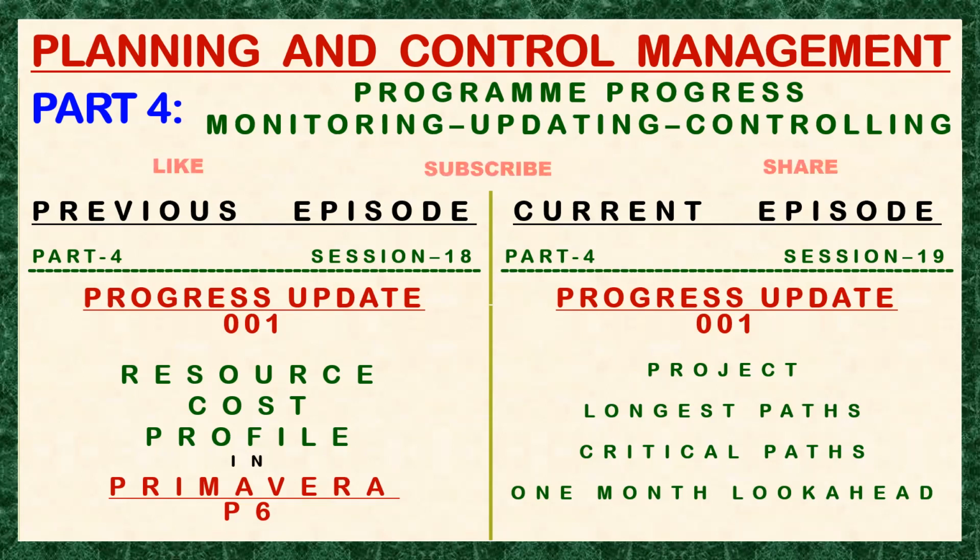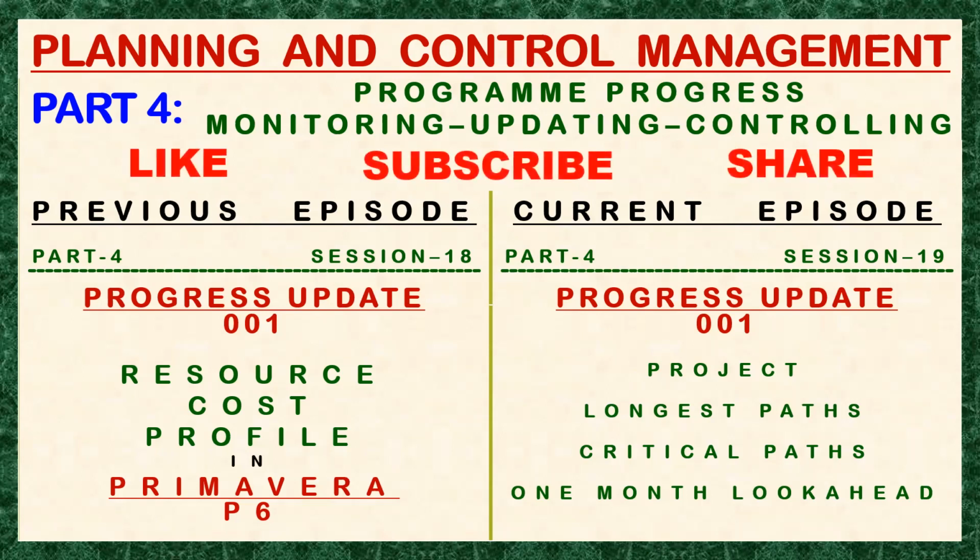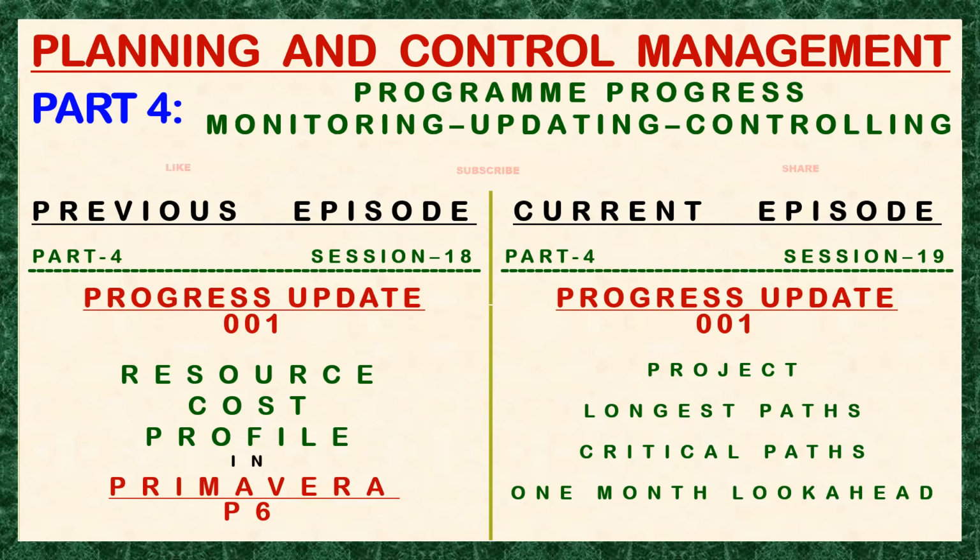Okay, so how about the look ahead schedule? This one can give us the information of what are those remaining activities, or maybe part of the remaining activities, that could possibly be achieved, or any target achievement required or committed by the team for a particular period, either to expedite the work or to recover any slippage.